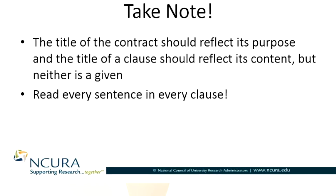Fixed price contracts: a contractor is paid for work completed based upon a pre-agreed or fixed price for the contracted work. The financial risk is on the contractor — the contractor must manage costs to stay within the agreed price. This is the standard method of contracting for commercial items and between commercial entities, whether buying and selling equipment, supplies, services, or other commercial goods. Fixed price contracts are absolutely the predominant method of contracting in the commercial world.